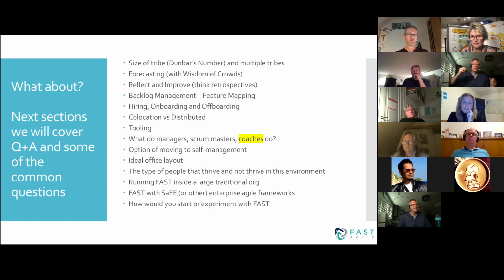They come in, tell us about this thing, this feature. Well, this feature is flim, flam, flow. So I hear flim, flam, flow. I've just written down 3 column stories. And we moved away from that verbiage of stories and epics. We just call it a chunk. So that feature is now broken down into 3 sub-chunks, flim, flam, and flow. Well, okay, does that represent what you're talking about?